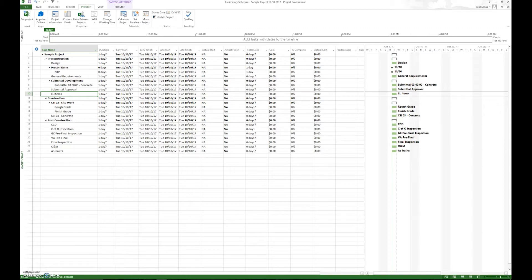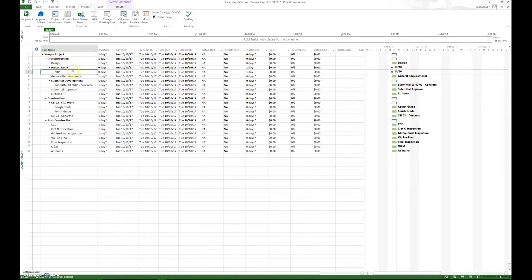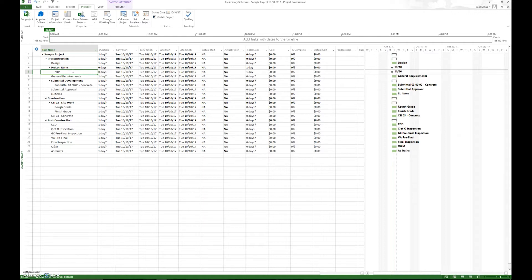Now you're going to have some one-day activities in there. You're going to have some zero-day activities in there, say like NTP here. Those are okay, but the vast majority, and I always say 95% of all your activities need to be between that two and 12-day.